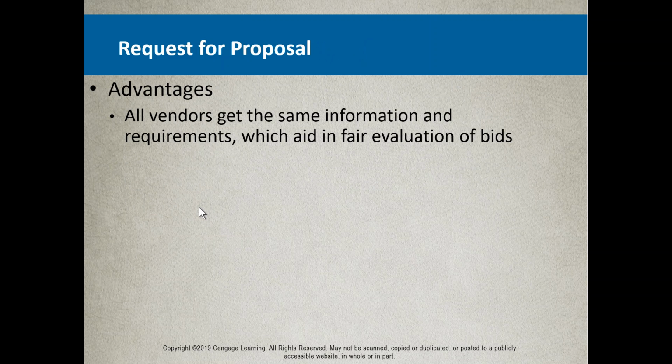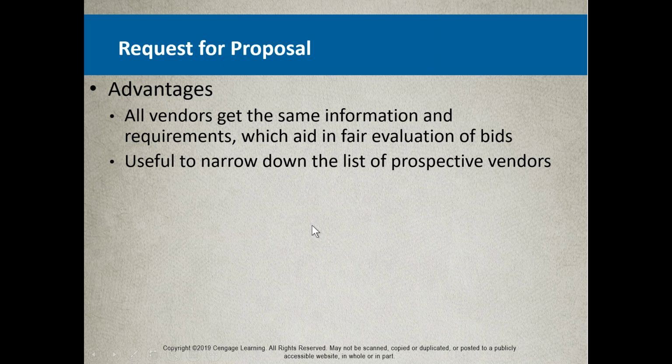The advantage of these requests for proposal is that all the vendors competing for your business are evaluated in a fair way, especially in government. If we want to build a new computer lab, we have to send out a request for proposal to multiple companies. They all bid on it, so it's a fair process because it's a government contract, and usually the government just purchases the cheapest one that comes in that meets the requirements.